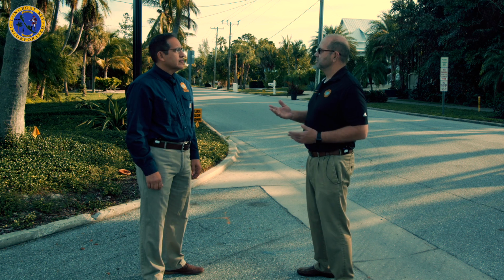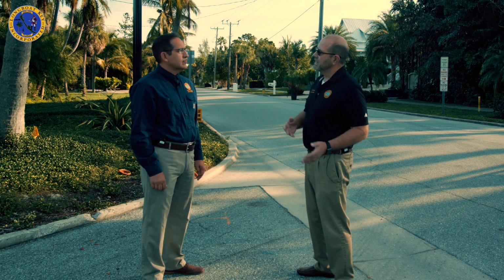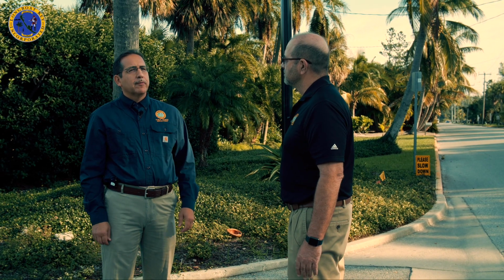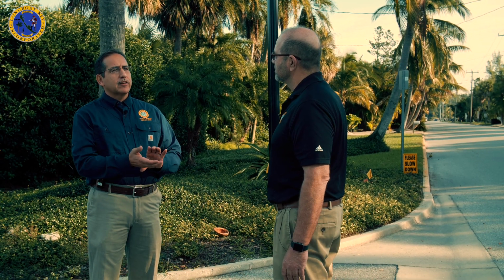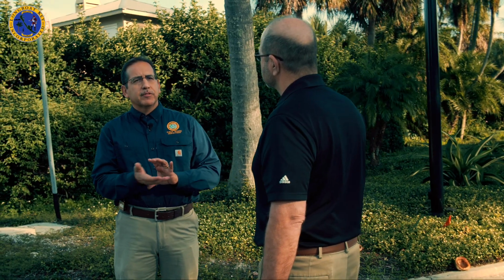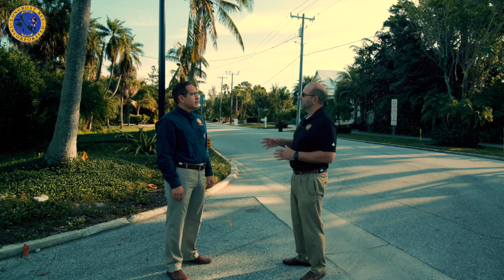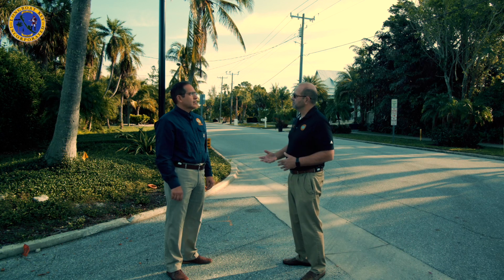And I think we know this, but it might be helpful for the public. There's portions of the project that the town is doing, and there's portions that Florida Power and Light's doing. Sure. We're doing all the electrical undergrounding and putting in the infrastructure, and FPL is helping us coordinate the switch orders. They provide the materials, and they provide a rebate to the town because we're doing the project ourselves. And then once we do all the conversions of individual buildings and homes, FPL then comes back and deals with the wires, the aerial wires, and the poles.